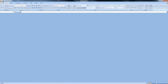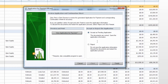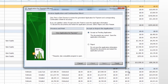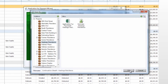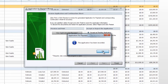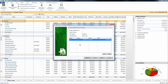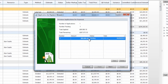Once you've reviewed that and confirmed that everything looks good, you can come back here to accept this as a pending application. When you click finish it will prompt you to save the application to your job, so you can go ahead and save that and the continuation sheet as well, and it'll let you know the application has been recorded. Now if you go back to generate a second application for payment, the steps are going to be exactly the same except you'll see here that we do have one application previously generated and that one is pending at the moment for this amount applied for.